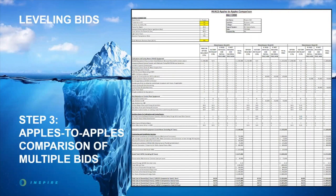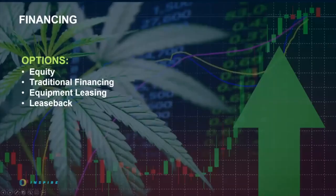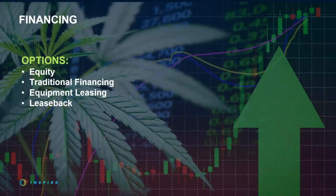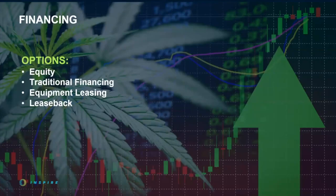Now that all those numbers are rolled up into a total budget, how did we do against the estimated budget set at the outset of the project? Are we within budget? Great — let's move to step four. If not, let's talk about some financing options. We see three typical forms of financing used in the cannabis space: equity financing, where you offer part of your business in exchange for capital; traditional financing, which may come directly from a bank or indirectly from a private source based upon creditworthiness; or equipment leasing. Leasebacks are a model that have been around a long time in other market segments and are making an entry into the cannabis space, but are yet to be seen if they'll be successful. We can help connect you with ecosystem partners who offer a fair exchange of value. In the end, it is up to your team to evaluate all your options carefully, read the fine print, and make sure it is a sound business decision. Keep in mind that in the cannabis business, most manufacturers require significant funds upfront, and you will need your funds to be liquid at the appropriate time to be sure you don't delay your schedule.